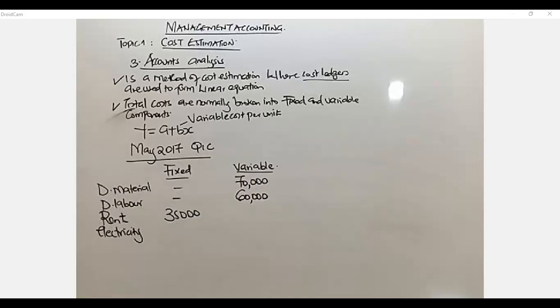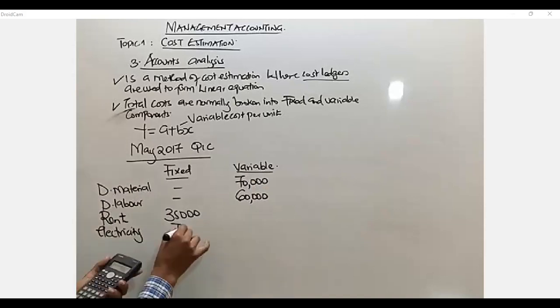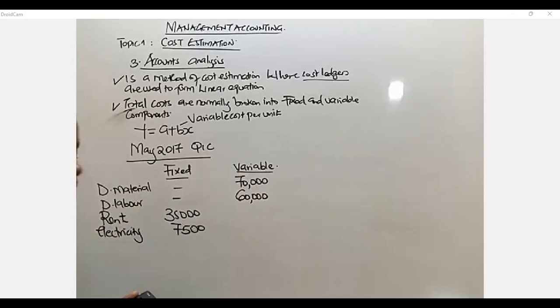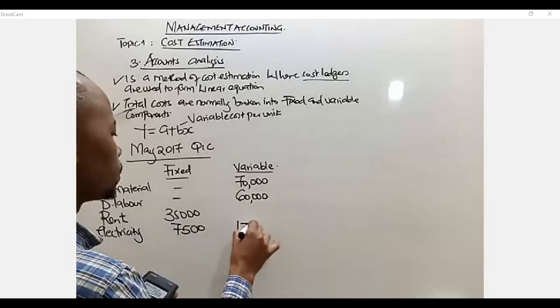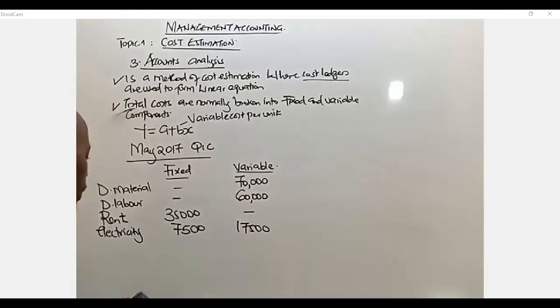So if 30 is fixed, 70 is variable. So what am I supposed to do? I just need to take my calculator, say 0.3 times 25,000 is fixed. So it's 7,500 fixed. So the other amount is variable, 25,000 minus 7,500, which is 17,500. 17,500 is variable.